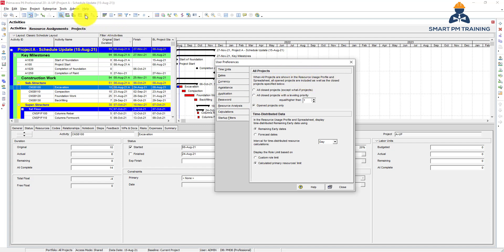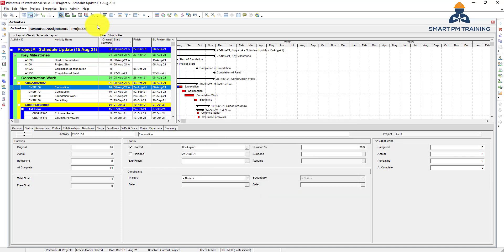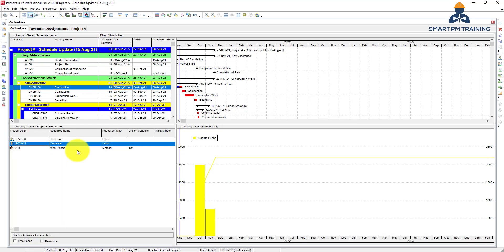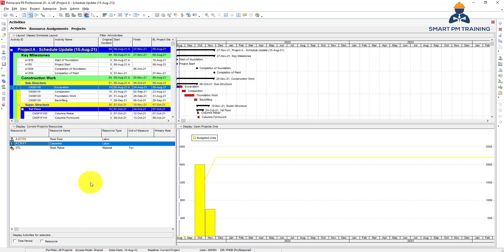Password for the application resources analysis. It will ask you when you click on resource usage profile here, so what projects should it reflect? All closed projects except for what-if, or just open projects? So it makes sense that you want to do it for the open projects only. And also as I talked before, you can always display from here, so you can filter by which resources and make sure that this is for the open project. It just doesn't make sense that you reflect that for all closed projects in the hierarchy under the enterprise project structure.